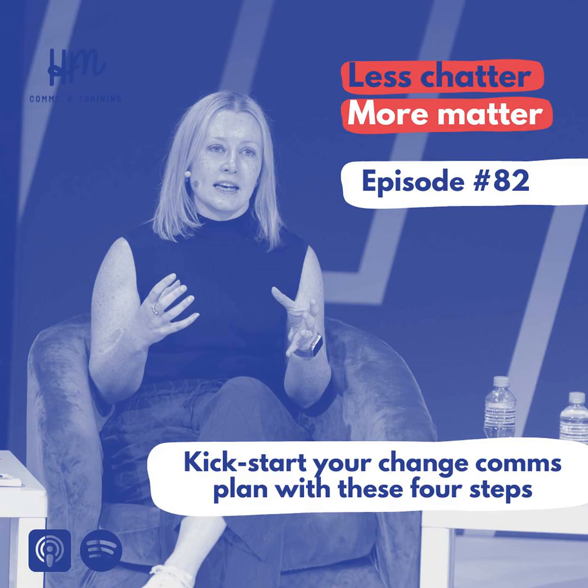So step two, sometimes combined with step one, depending on who is leading the change, is take the brief. Now, in smaller teams and organizations, the person leading the change can also be the sponsor. So you might be able to take a brief and complete the scope at the same time. But often the person who is ultimately responsible, accountable, and the sponsor for the change is not the project lead. So you need to interview them separately.